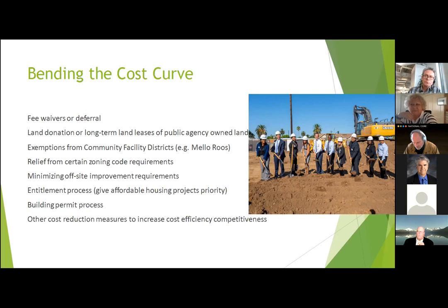What we believe is those same opportunities exist for those cities that really want affordable housing, that really want to partner in coming up with solutions. And let me put it in a couple of major categories, and what Mo is just alluding to. The first part is the entitlement/environmental category. If a city were to say, here's a piece of land that we think is right for affordable housing, and if a city were to take that piece of land through the entitlement process, and get the environmental clearances in place, and then approach developers about, we have a fully entitled, environmentally approved piece of property for affordable housing, you have saved us years and hundreds of thousands of dollars in process and risk associated with being able to get something done.